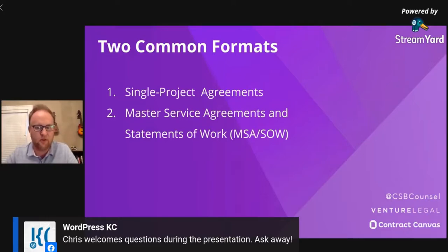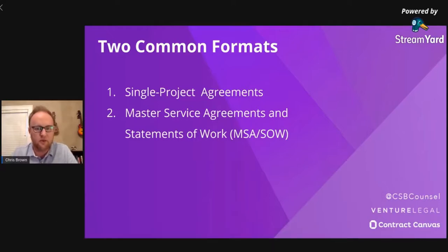So the statement of work number one could be the wireframe, marketing strategy, and so on. Statement of work number two could be the actual development of the website. And statement of work number three could be a 1-year maintenance contract where you update plugins and everything else. The beauty of that is you don't have to go through all those legal terms and negotiations when you're just doing SOWs. I mean, you still have to negotiate the price and so on, but at least all the legal stuff is done and out of the way. So it just makes it a lot easier for you to sell multiple projects to the same client.